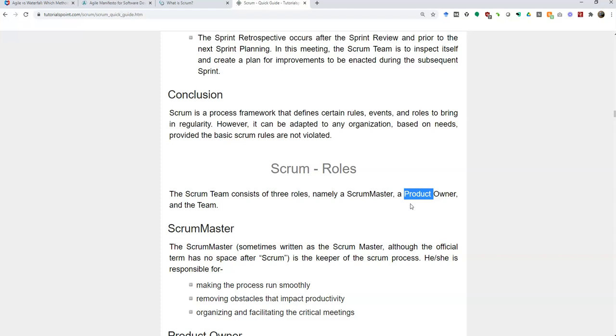Again, this is a very quick iterative process. I'm just going to say the traditional term: it's called a sprint, and I'll show you those terms here in a second. But a sprint is one iteration. It's very quick. The traditional sprint is 30 days. Sometimes it's only 2 weeks. Sometimes it's longer, 2 months, something like that. There are variations on all this stuff, honestly.